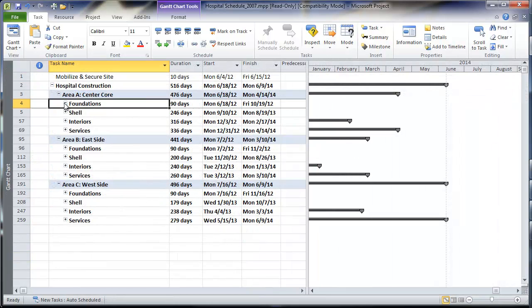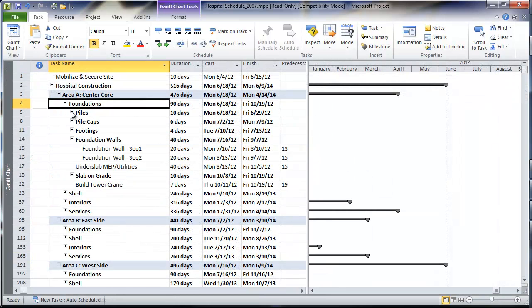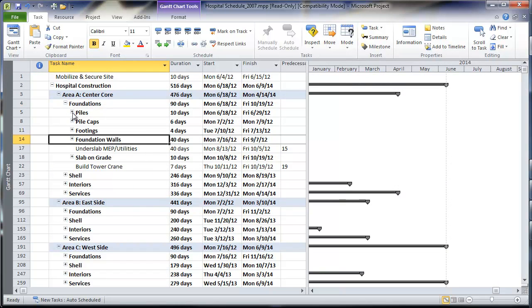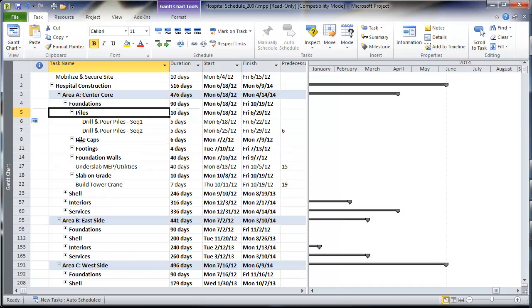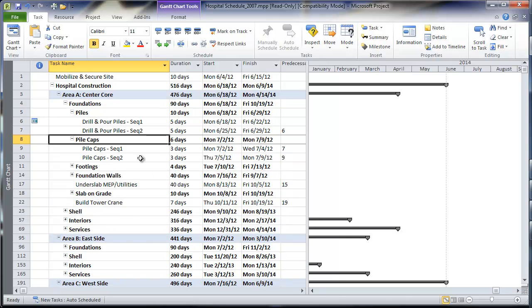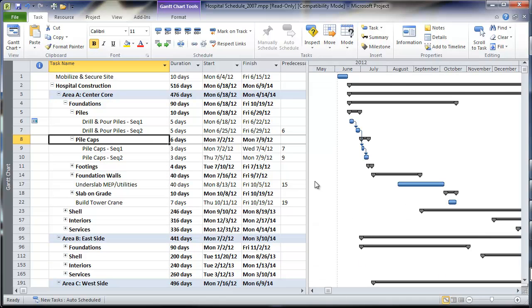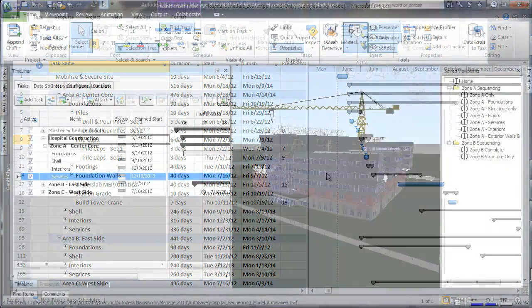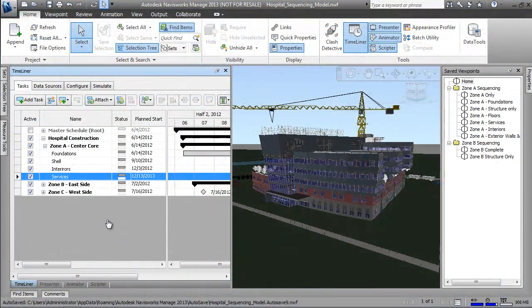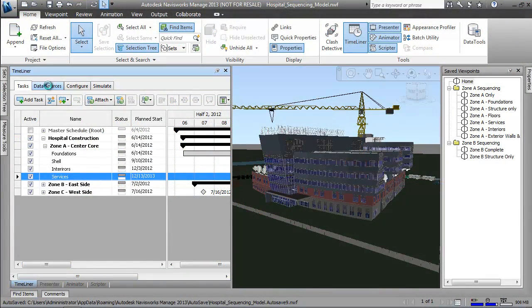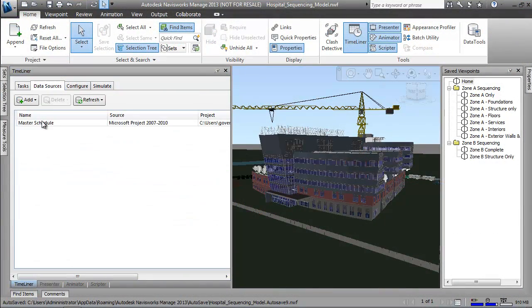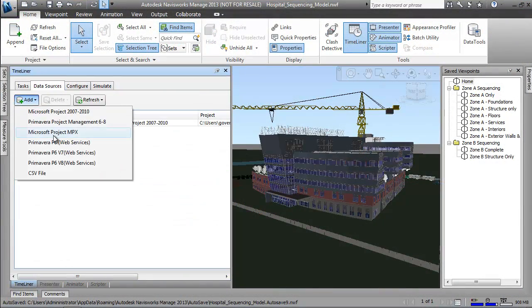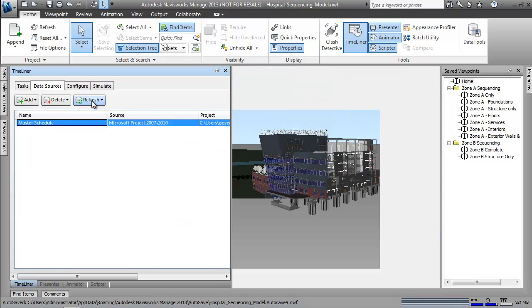As we jump ahead in the process, we see we have a completed schedule with all the detail needed for the specific tasks on our project. We connect to this completed schedule back in Navisworks and continue the 4D analysis, refining our tasks and the project information attached to them.